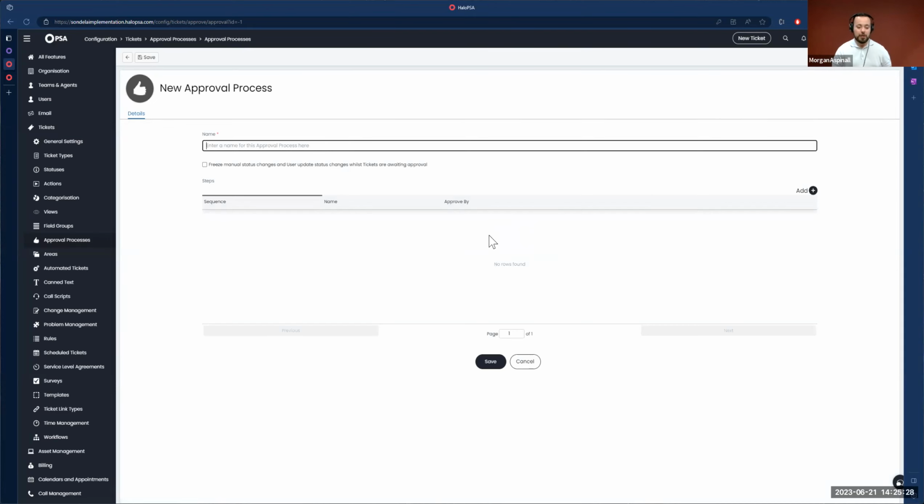So you can have one approval, but that one approval might have an initial peer review approval. And then if peer review is all good, then we can go to a main CAB for primary consideration and scheduling and implementation and all of that stuff. So you may have a technical sign off and a finance sign off, right? So from a technical perspective, it might be that whatever it is that we're going to install, technically that's going to work. And now we need to get some kind of financial approval on that.